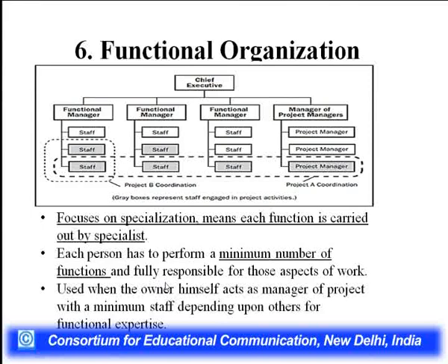So in this particular case, the focus of the functional organization is on specialization, which means each function is carried out by the specialist or the one who has the skill to perform it. Each person in this organization has to perform a minimum number of predefined functions and is fully responsible for those aspects of the work. And it is used when the owner himself acts as manager of the project with minimum staff, depending upon others for functional expertise.